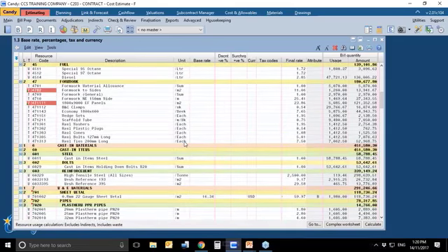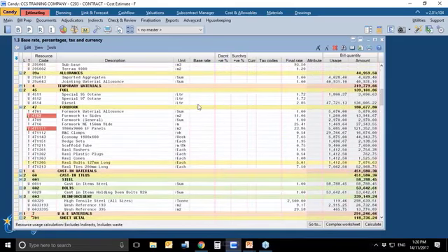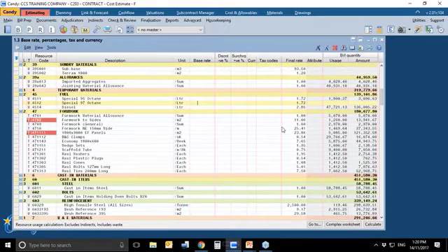I could go up. Let's do a quick example with diesel. Let's say the diesel on this project is bought in Saudi riyals. Now, you will notice that a lot of resources don't have a base rate yet. That's fine. For the resources that don't have a base rate, we're assuming all these resources are bought in the pricing currency, or all these resources are bought in AED.